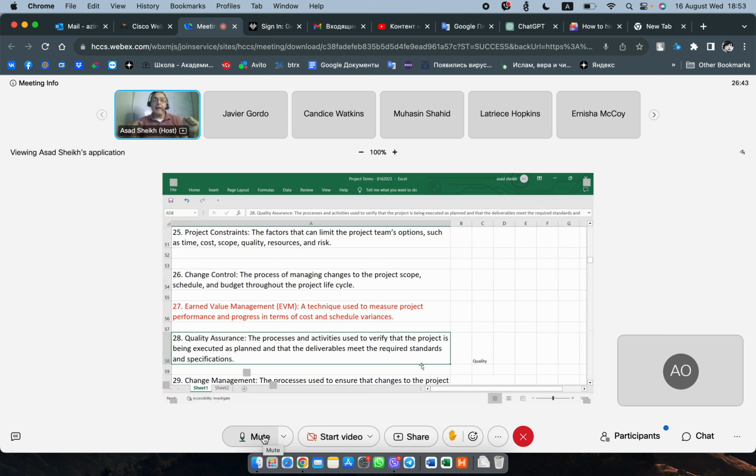So once you design, once you have a plan that has been figured out, brainstormed, discussed, and you have a schedule, then you have a baseline. You have a scope baseline, a cost baseline, and a schedule baseline. Once you have that, then if you have a change after that point, it has to go through change control. But before, it's part of your planning. Does that make sense? Yeah. Yes, definitely. Thank you, sir.